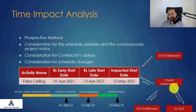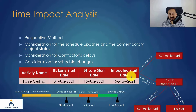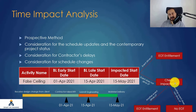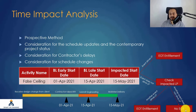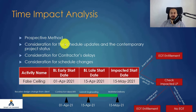However, if after the exercise the event does not drive the longest path and there is no other event driving the longest path either, then there is no EOT entitlement. That wraps up the comparison between Impacted as Planned and Time Impact Analysis.